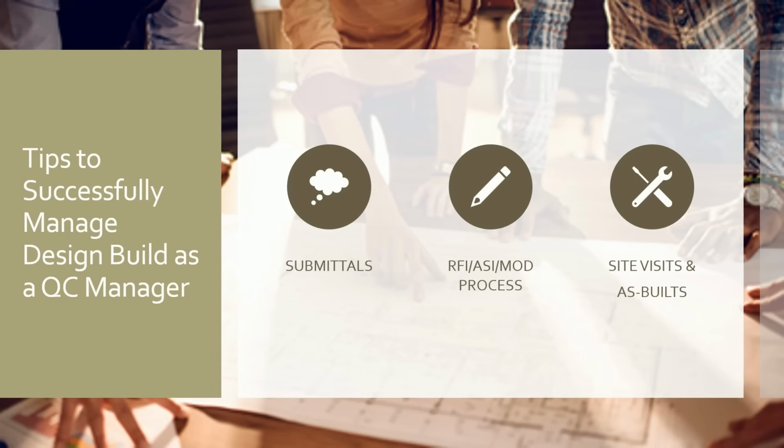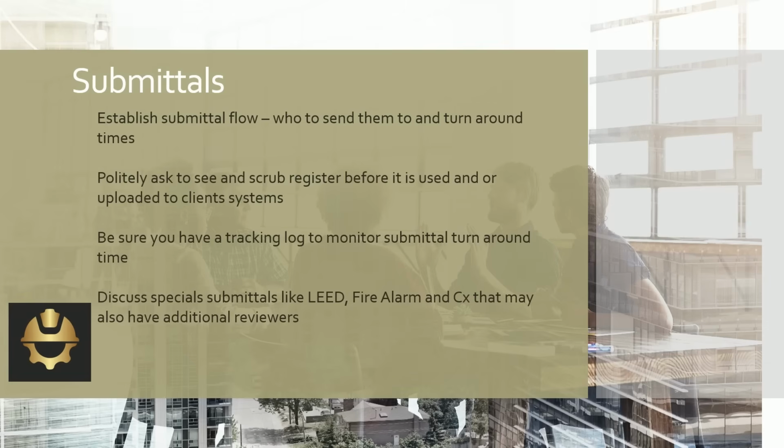All right. So first we're going to talk about submittals. When you meet with the design firm, it's really important that up front, before the design is done, you establish a flow of the submittals, a submittal flow. You need to talk about where you're going to send them to and turnaround times.